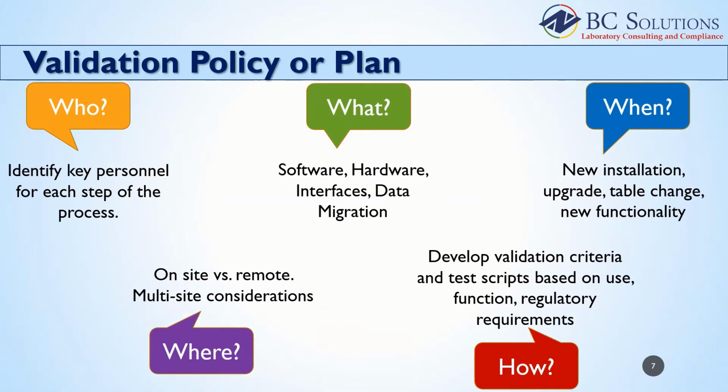Starting with who, identify key personnel responsible for each step of the validation plan. Who will be involved with software selection, validation planning, project management, and training? You also need to decide who will be responsible for developing the actual validation scripts and who will be implementing them.